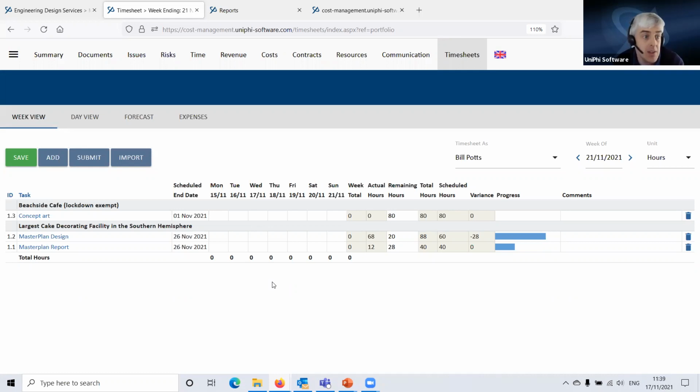as well as being a tool where we just capture their time. We're recording their data. We're doing more than that. We're informing them about what's happening on the project as well. And we're also letting them inform us, because the best data you get from people is from their timesheet. So in addition to them putting a comment against it, we are allowing them to provide an estimate of what their remaining hours are on that task.